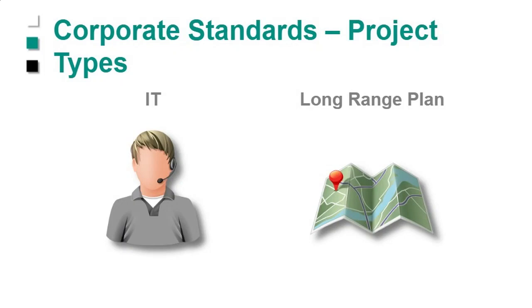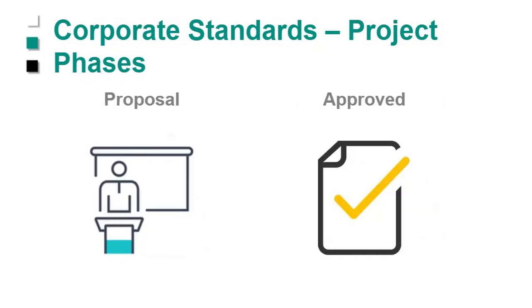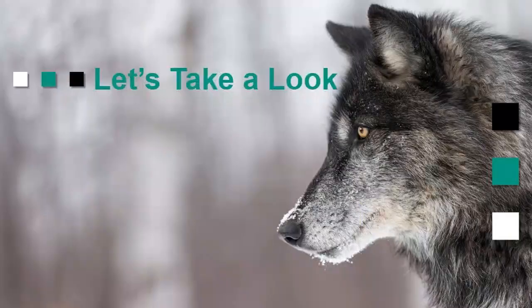And the way you're going to validate, depending on the phase you're in, will be quite different. If you're at a proposal stage, you may have higher level activities that will be longer because you're not going to do the deep dive to do a level 5 schedule at the proposal stage, right? So depending on the phase or stage of your project, that's going to make a difference as well. So we can handle all that. And we can add additional monitoring items as well.